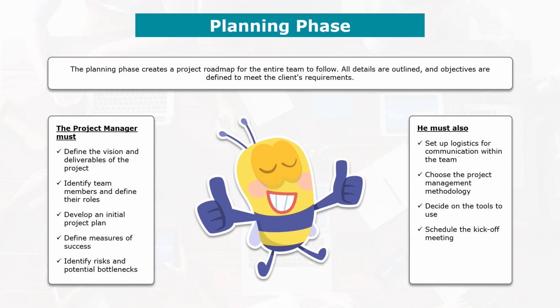The whole project team and stakeholders must be present at that meeting, even by phone or via video conference. You will have to set up the agenda and prepare the slides for the kickoff meeting. So these slides, you will have to send them before the meeting so that everyone can prepare, and give everyone the slides after the meeting for reference purposes.